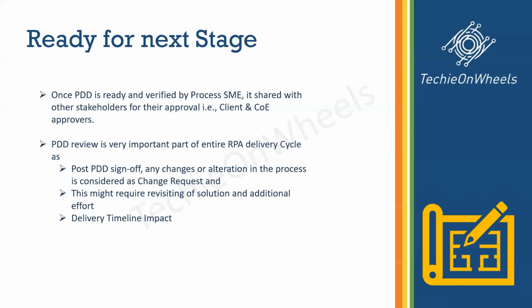This might require revisiting the solution and additional effort. So it is recommended that the PDD is properly verified, approved, and reviewed, to avoid any change request in future, as it might require increased development effort and the delivery timelines might get impacted. Once the PDD is approved, the team is ready for the solution design phase.